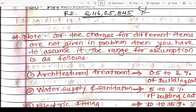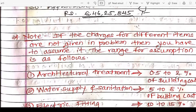If charges for different items are not given in a problem, you have to assume them. For architectural treatment, assume 0.5% to 2% of building cost. Someone may assume 0.5%, 1%, 1.5%, or 2% — the approximate cost will vary accordingly. Do not assume beyond 2% or below 0.5% for architectural treatment.